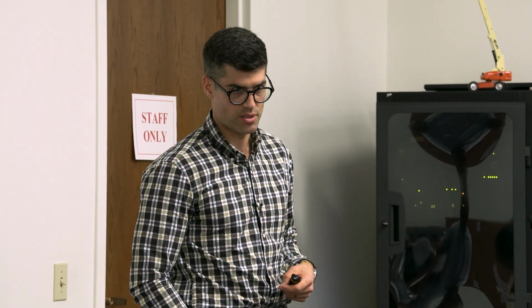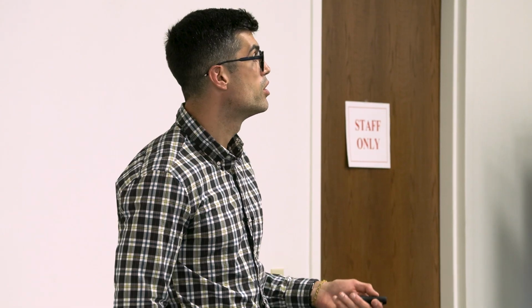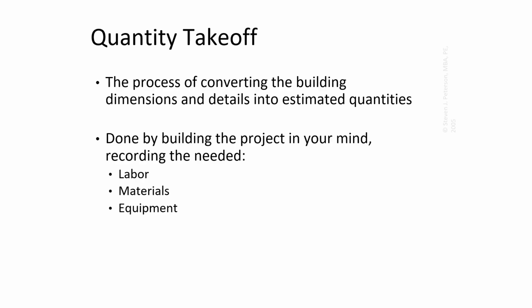Concrete cubic yardages, for example. I might not do all the concrete, but I'll check some columns, I'll check some floors, I'll check some spot footings. I'll check certain numbers that are really going to be impactful to make sure I'm comfortable with that subcontractor's bid, right? But this is, again, done by building the project in our mind, and that is knowing the process, knowing the labor, materials, and equipment that are needed to complete that specific scope of work.